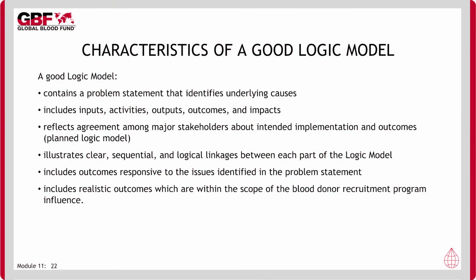It may be helpful to highlight the key characteristics of a good logic model. A starting point is to have a logic model that contains a problem statement that identifies underlying causes. The logic model should include inputs, activities, outputs, outcomes, and impacts, and it should also reflect agreement among major stakeholders about intended implementation and outcomes.